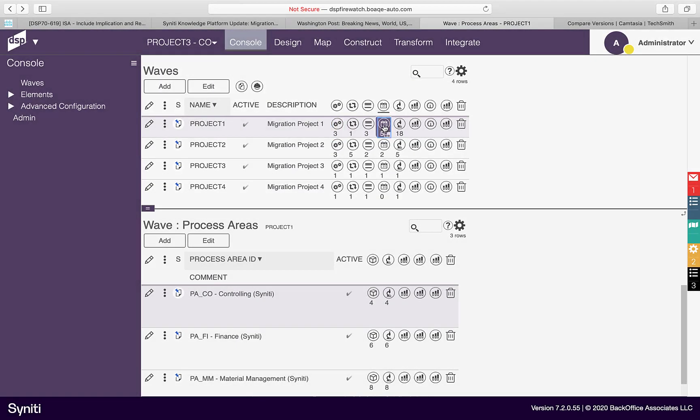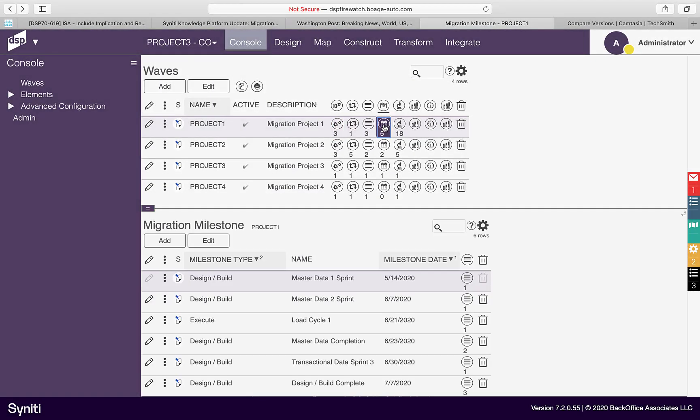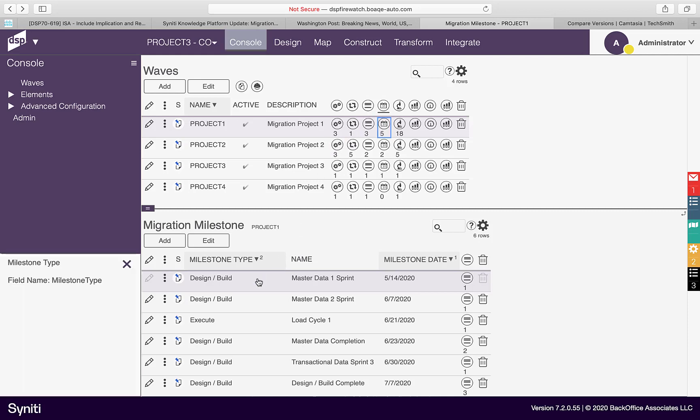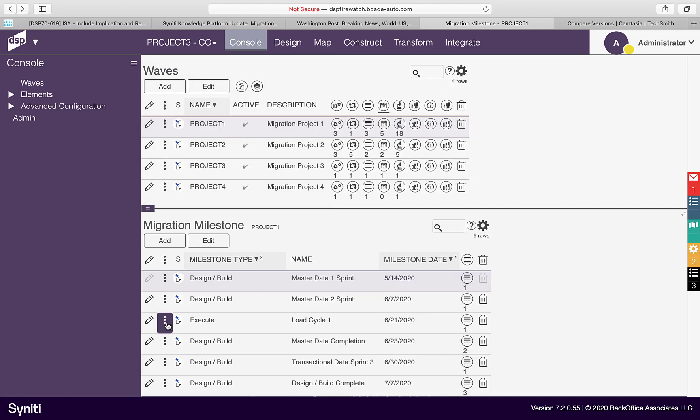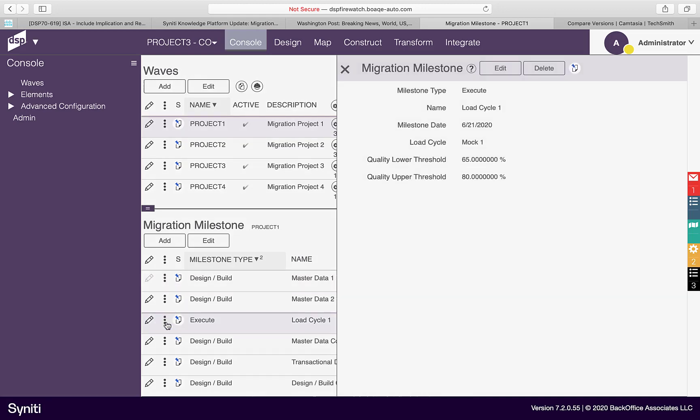Milestones of type design/build are used to set goals related to design, mapping, and rule build complete. Whereas Milestones of type Execute are used to set goals related to the data quality of a specific load cycle. The scope of which objects are included in a milestone is based upon the planning groups assigned to that milestone.